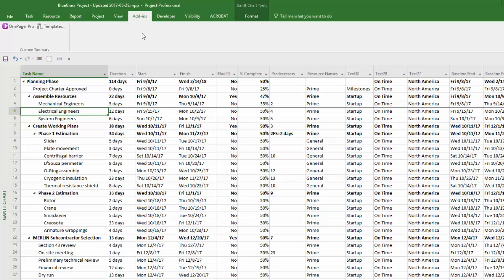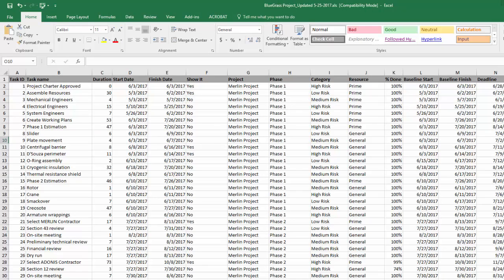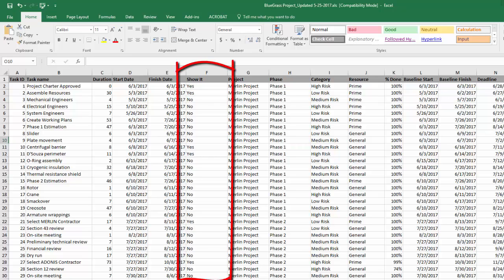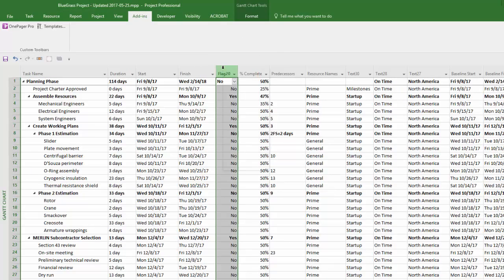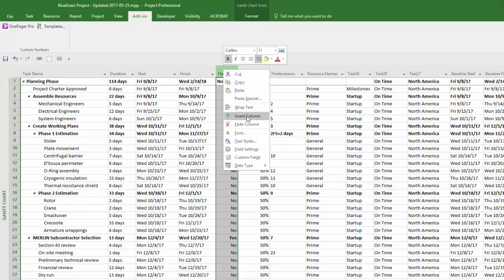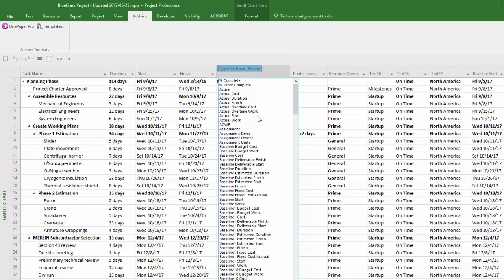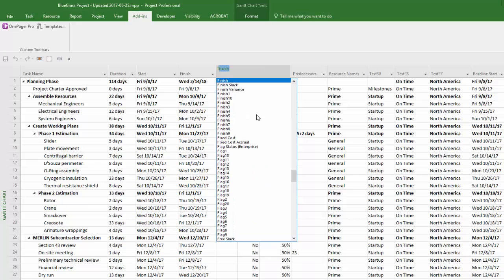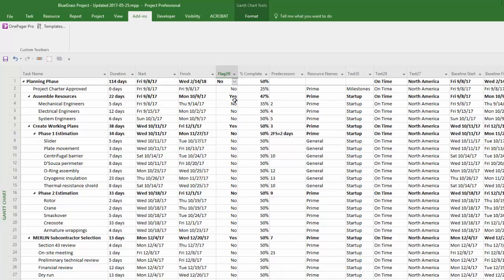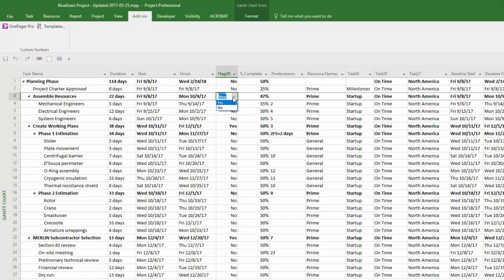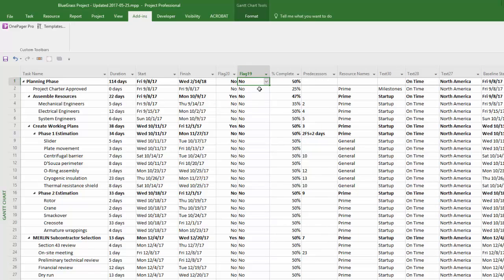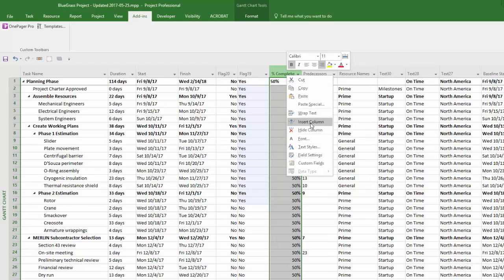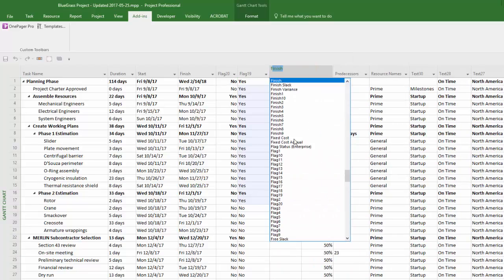All of this data can be used for display or to drive automated grouping and formatting in OnePager. If you want to be choosy about the tasks and milestones you're pulling into your visual, the easiest way is to add a column with yes values to your document. You can add as many columns to your project or Excel file with different combinations of yeses to create charts that will fulfill the needs of different conversations or presentations.